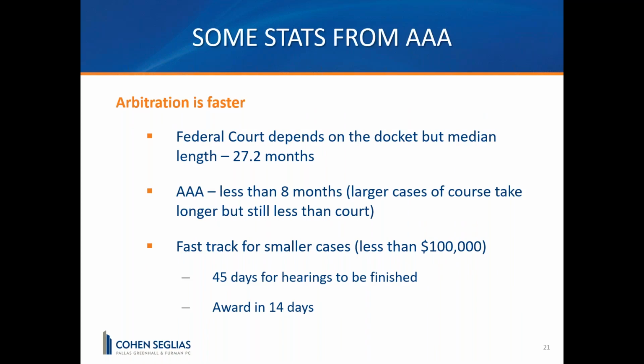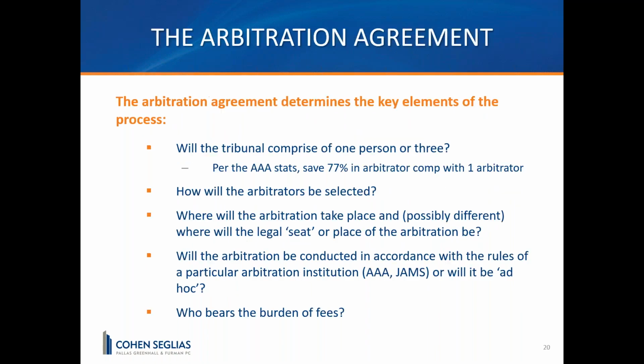Sorry. Yeah, sure. One thing I just wanted to point out with respect to the arbitration agreement as well is that it's very important that the language that is used for what claims are subject to arbitration is very specific. There are often disputes as to whether or not the arbitration language will govern your dispute. So you want to make sure it's carefully crafted to cover basically any dispute with respect to the subcontract, whether that includes a breach, negligence, or whatever, so that you're not ending up having to fight about whether a dispute actually is subject to arbitration itself.